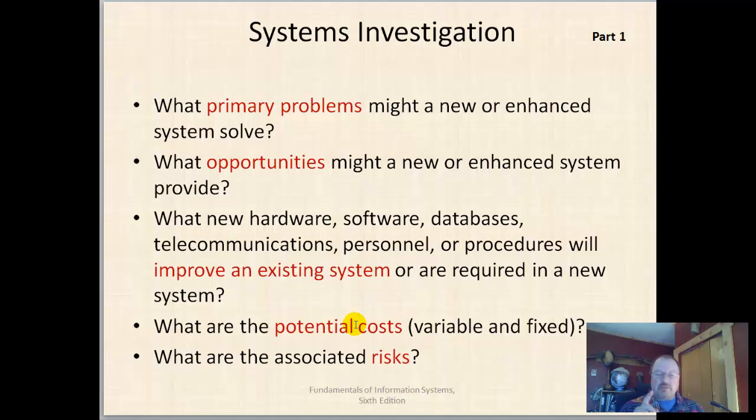Because remember, you have not only the cost of the people themselves, but you have indirect costs, which are healthcare costs, which is retirement. So you have a lot of additional costs along with that initial salary. Now, I don't want to just focus on the people. That tends to be the most expensive part, but also electricity, also gasoline.